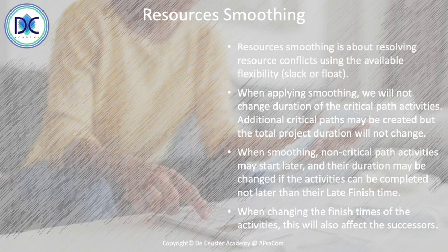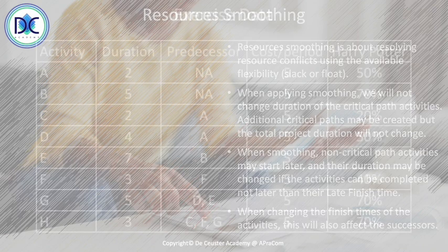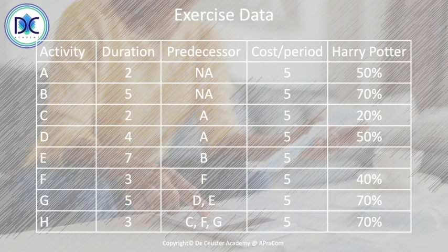When we change the late finish or the finish times of the activities, we must also look into the action or the reaction on the successors, because the successors of the activities that start later or are taking longer, which have a new finish date, will also have a different start date. And we have to take all these things into consideration.